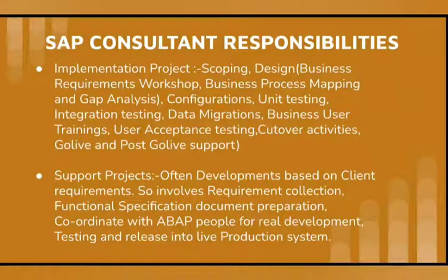Once the testing is done, the change request can be moved into the production system, that is, released into production through batches. Generally these support developments will be handled in batches, every month or 2 months. These batches of released change requests will be moved into production, and the business can execute the new development process. And the next slide is about